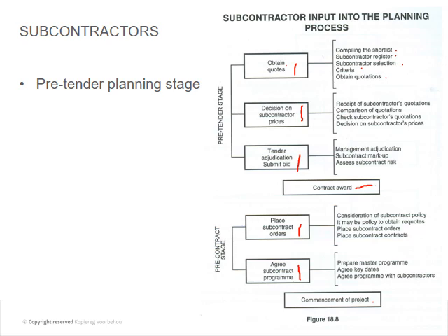Yeah. So if it's a large tender, then the main contractor will have tenders going out to their subcontractors. But if it's the smaller or medium-sized contracts, they get quotes for certain things. It's like a selective tender. The contractor selects their own contractor.